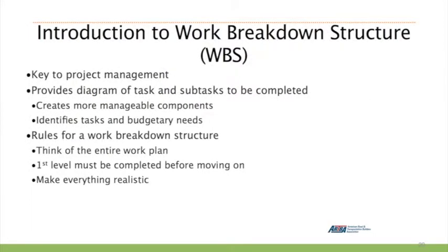When writing a work plan, the process which you should use is a key process from project management. It is called the Work Breakdown Structure, or WBS. A WBS guides you through the high-level responsibilities which need to be completed first, and then allows you to break them down into tasks that can then be assigned to staff members on their individual work plans.